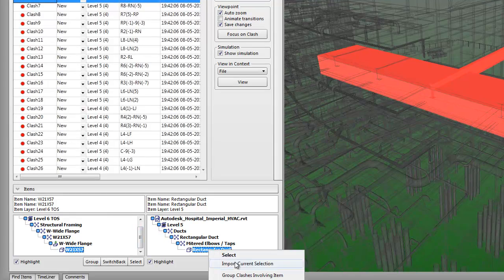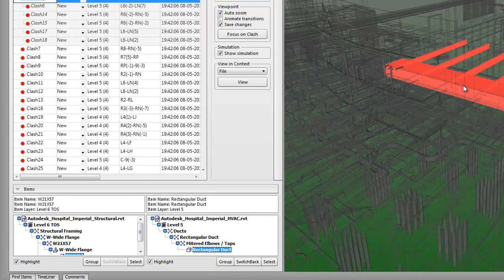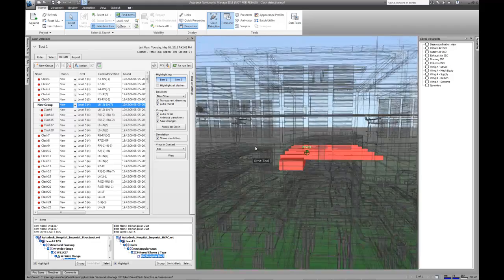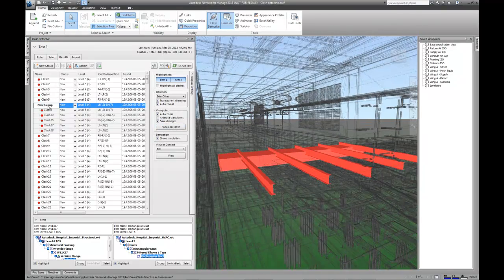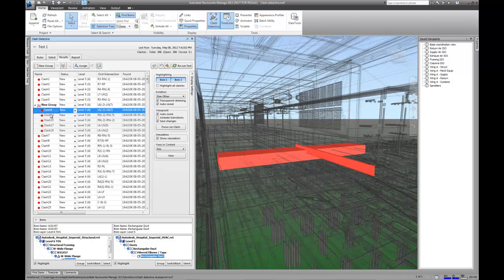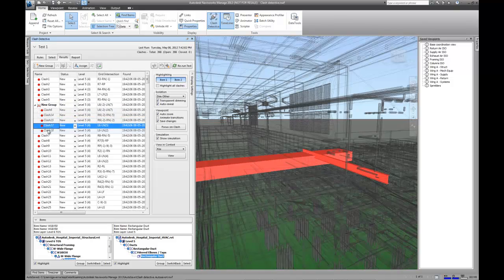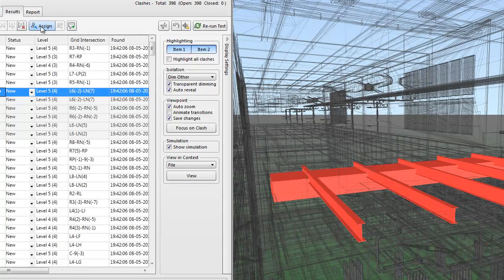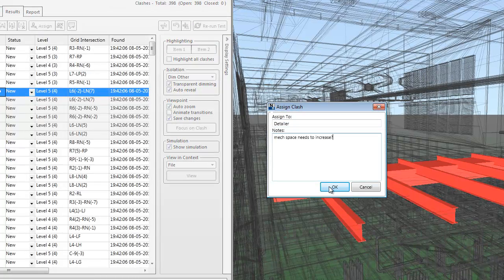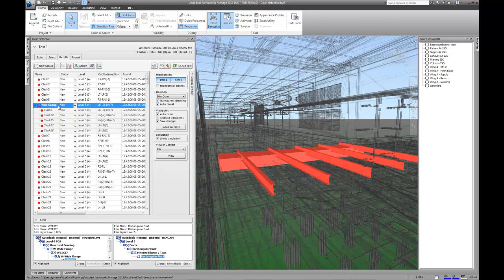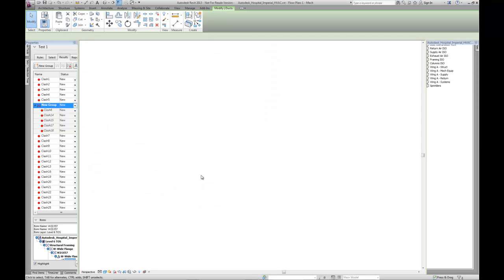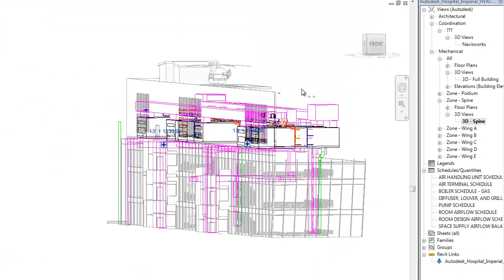Once a whole project view is understood, we can then move into a micro-level coordination, where we leverage detailed views of the model and get very specific on which elements are coordinated, and that the coordination is done in a logical and deliberate way, ensuring accuracy. The results of micro-level coordination will carry through to the field execution when daily or weekly coordination meetings and tasks are done using the framework and organization of the models done here in the multidiscipline coordination.